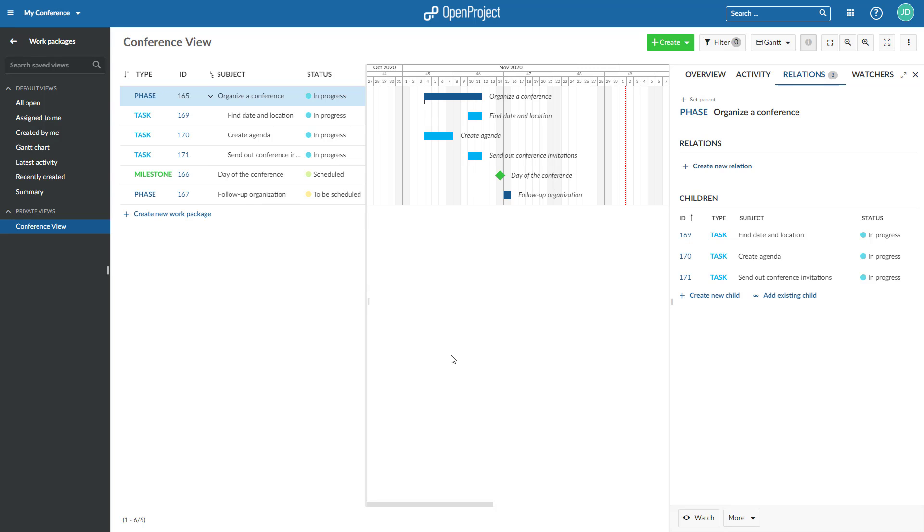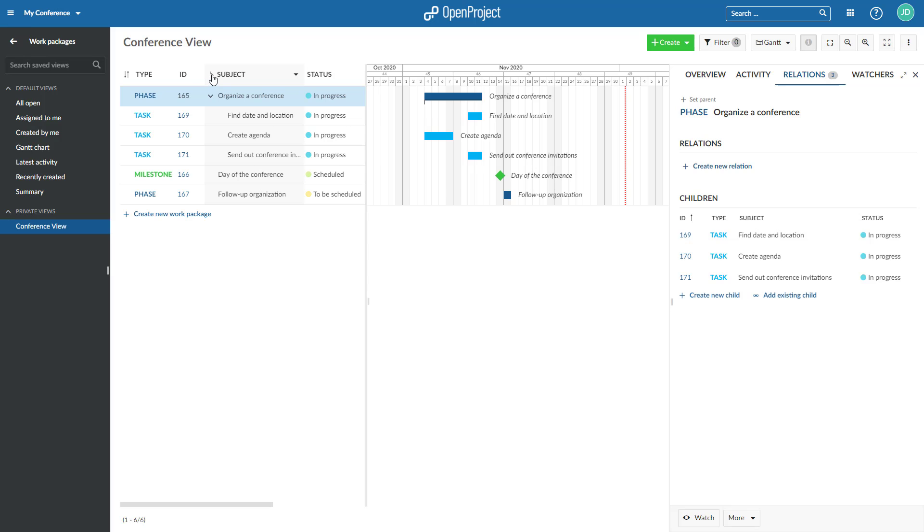To display work package hierarchies, make sure the subject column is displayed. You can activate or deactivate the hierarchy by pressing the icon next to the subject.